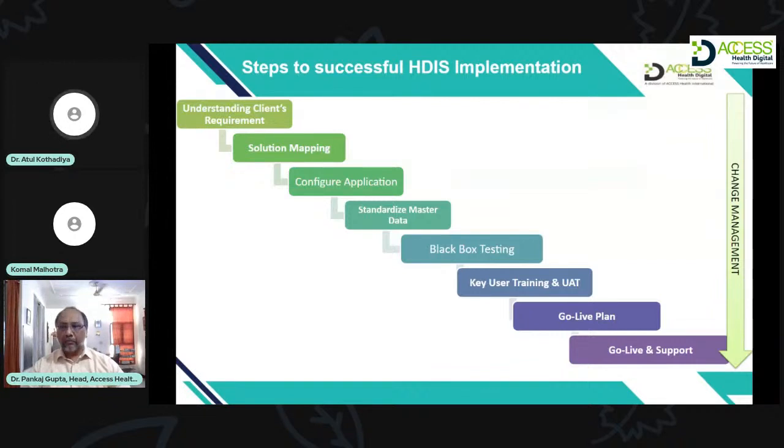Now, as a solution, basically, we moved both the servers onto the same rack, and that problem was resolved. Now, what point I'm trying to make in this case is basically not only the functional requirements, not only the requirements which are given by the client are important, but also studying the infrastructure is a very big key step in any implementation basically.